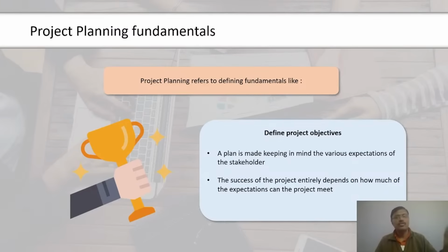Again, organizational process assets are an input because the organization may have some policies for reporting the cost budget, or there might be some cost budgeting tools being used. There are various tools and techniques used in determining budgets. The cost aggregation technique involves adding up the costs and aggregating them at the control account level, so the cost can be managed in a better way.